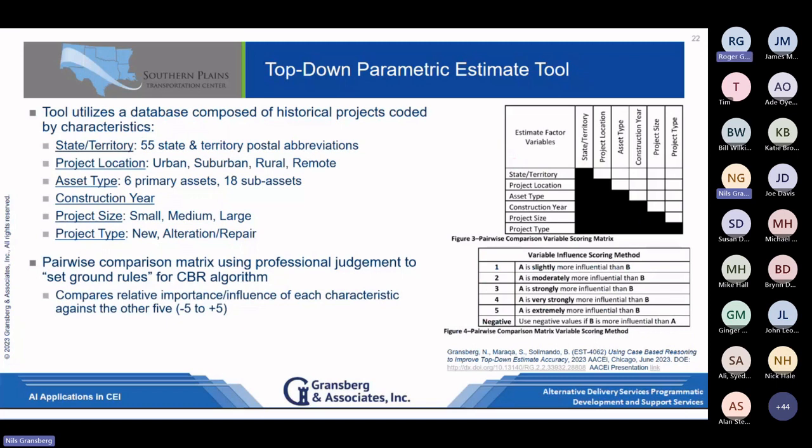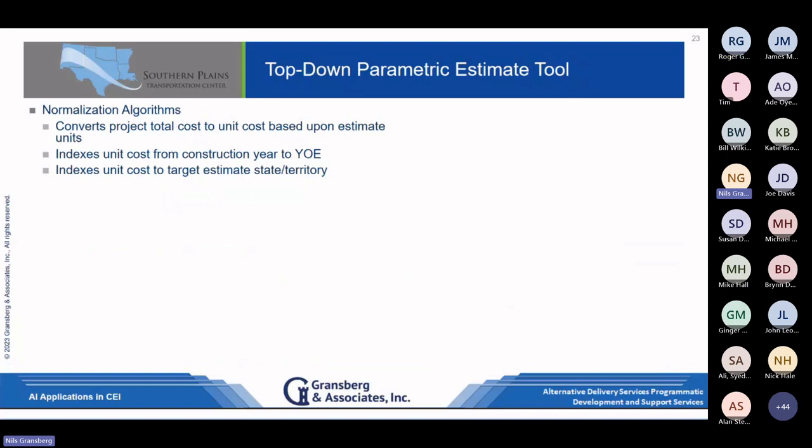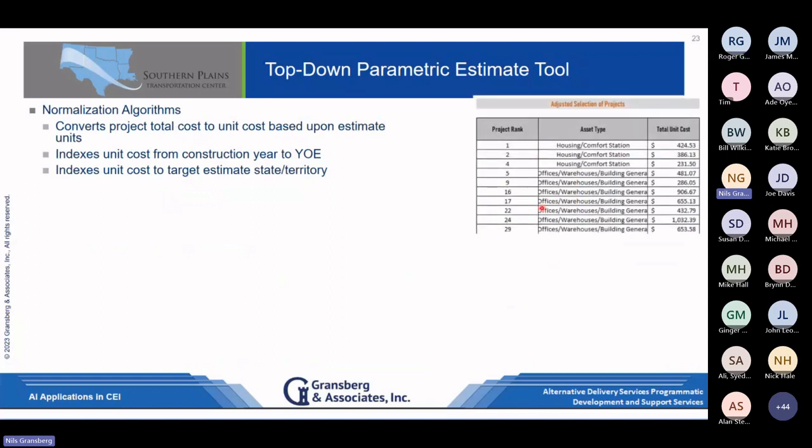What it does is calculate a percentage, an importance index, essentially, which tells the CBR, okay, when I'm looking at importance, I'm going to go with the most important features first. I'm going to prioritize these, and then it converts each project into a case that it scores according to its similarity to your target project. That's what it uses to query and pull out a list. So the next piece is, you've got that list, right?